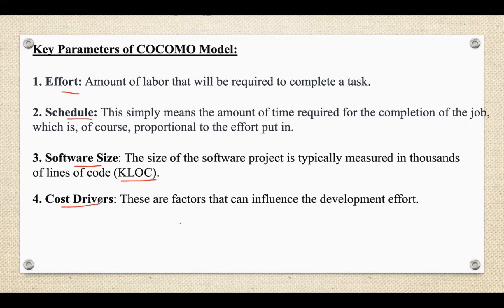Cost drivers are specific attributes or characteristics of the project that influence the overall effort needed to complete it. They represent factors such as product reliability, development environment, team experience, etc. There are various categories of cost drivers: product attributes, hardware attributes, personal attributes, and project attributes. These drivers will be discussed in detail in the intermediate COCOMO model. Additional parameters include constants, effort adjustment factor, productivity factor, and phase-dependent factors.